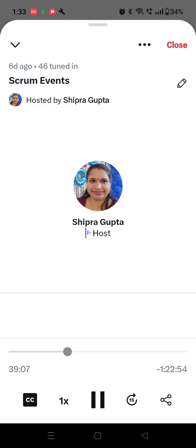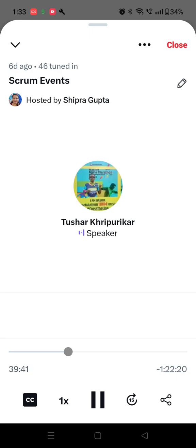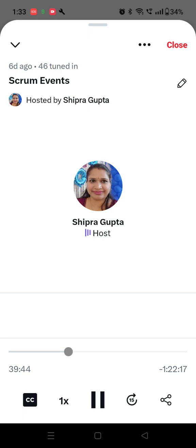This way, you pick up all the stories which you can do depending on the dependency, and total up the items, and you say, okay, roughly I have taken up till 98 story points. So these are the items I'll do in this particular sprint. And once you reach your capacity of 100 story points, everything else is moved back to the product backlog. Does that make sense? Yes. Is the sprint planning clear?